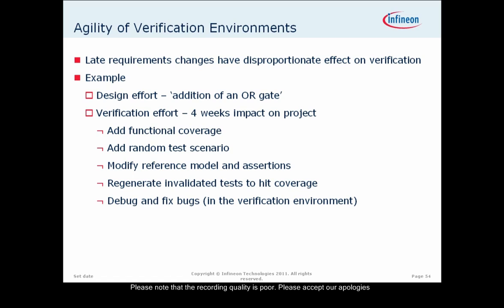So my second challenge relates to the agility of verification environments, how adaptable verification environments are to change requirements. I think our experience is that when we get late change requirements, which we often do, then instead of getting something like a 2-to-1 ratio between verification and design effort, it goes up to something like 10-to-1 or even higher.